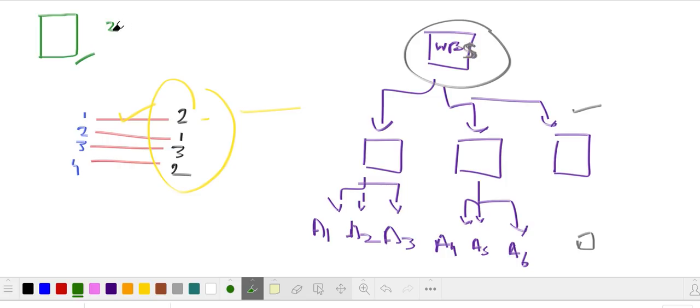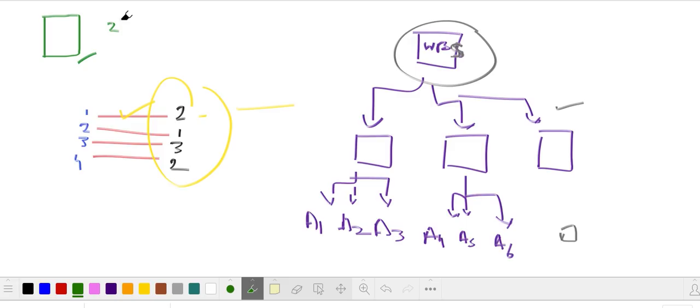But this is a real-based scenario, a real-based situation. A developer just said, oh, it's going to take 2 days, and on the very first day after giving the estimation, when the project started and his first day came, he realized the designer didn't make the mockups properly. The mockup was just an image, it didn't have the elements the way developers work, so he couldn't start his work. So he had to go back to the project manager and the designer to ask for the right mockups.